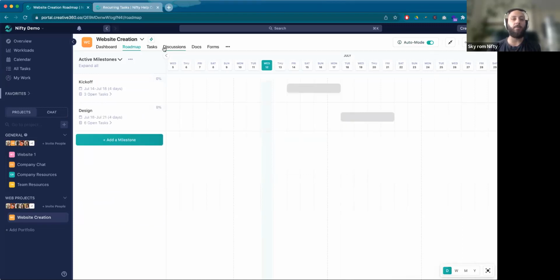You turn on auto mode because you can just change those task deadlines and your milestones will react accordingly. This, like I said, is impacted by one of the other changes we did make in 3.5, which is cascading dependencies. So when in manual mode, if I change the dates of my milestone, tasks within my milestone will not change their dates by default, because it's up to me to adjust the deadlines for those tasks. It's auto mode, but more.